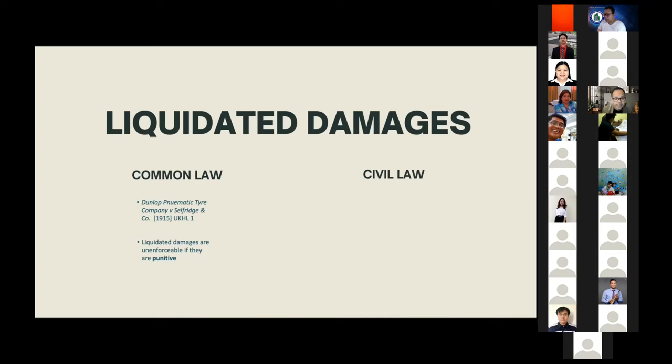And finally, it is a penalty when the sum is made payable as a single lump sum of compensation on the occurrence of one or more events, some of which are serious and others trivial in nature. This was the ruling as well in the case of Phillips versus Attorney General of Hong Kong. So in a nutshell, if you are practicing in a common law jurisdiction, a liquidated damages clause is unenforceable if it is punitive, meaning it acts as a penalty.